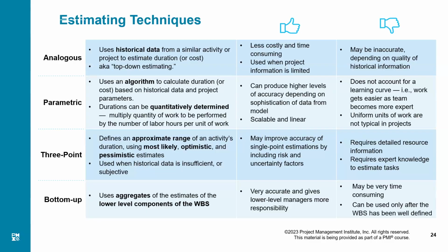But I know earlier in my organization, they have done a similar project in the past. So I'll go and refer to that project's details and see how long that project took to finish, and based on that information, I'll estimate the duration of the current project.